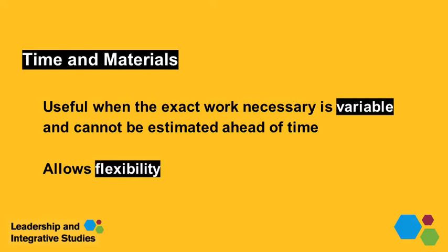A time and materials contract is sometimes easier to negotiate and easier to make changes to if the project requirements are likely to change, because there is flexibility for the purchaser to buy as many hours of various specialists' time that is needed. But these types of contracts also require the supplier to use detailed information systems to keep track of the time and material expenditures.